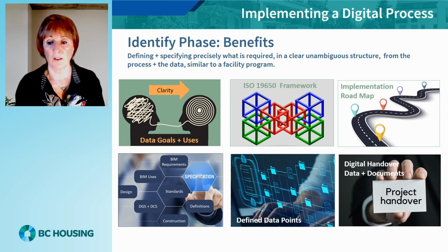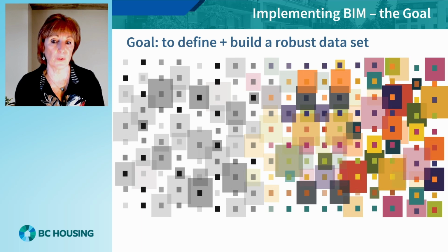In addition, the data points required for a digital handover need to be clearly articulated, along with the process for generating a record model that correctly represents the built facility. As you move through the process from early design to IFC to construction to handover, each participant and group is contributing to building the dataset, so that by handover, a rich, robust dataset representing the facility has been accumulated and is ready for transfer to the FM teams.